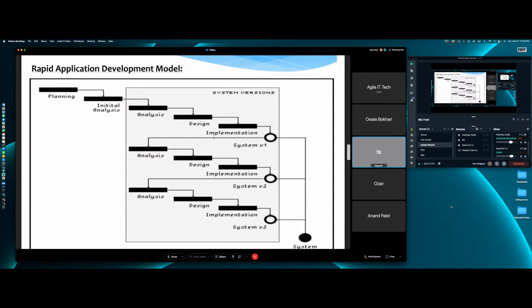So at the end of 6 months, which integration teams will happen first? Team one and two. While you're integrating one and two, team three can take like a month, or 6 weeks, to integrate one with three, one with two. Team three can deliver it 6 weeks late if it had to be. I got slack there. You understand?